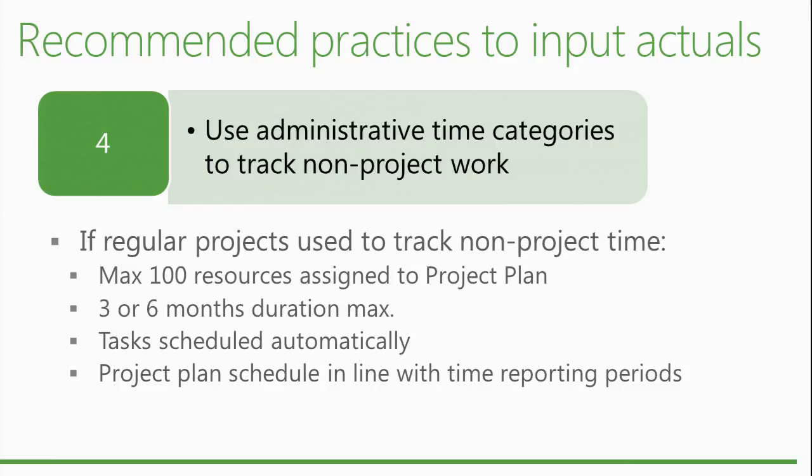So that's also an option you can have. If you want to have something that is at a very high level, you can decide to report the time just at the project level and just on a bucket per week, and that's it. And then Project Server is going to recalculate and distribute all that across the periods, basically the days and so forth.